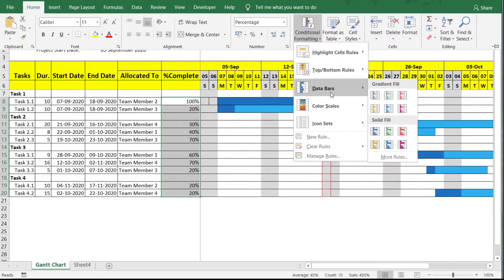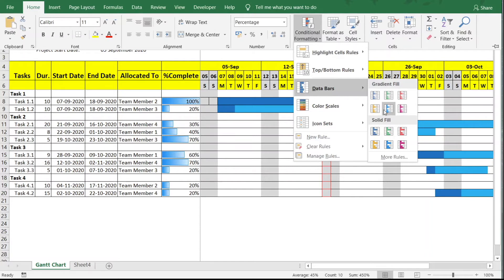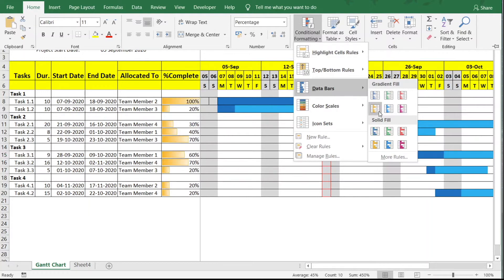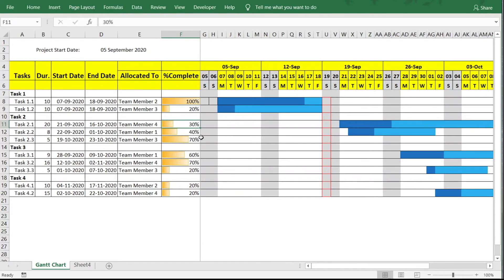Go to Home, then Conditional Formatting, and under that go to Data Bars. There are two kinds: gradient fill and solid fill. You can hover over these to see how they look. I'm choosing the orange data bar. Now the progress field shows progress bars that change as the percentage completion value changes — for example, if a task is 30% complete and you change it to 70%, the bar updates accordingly.